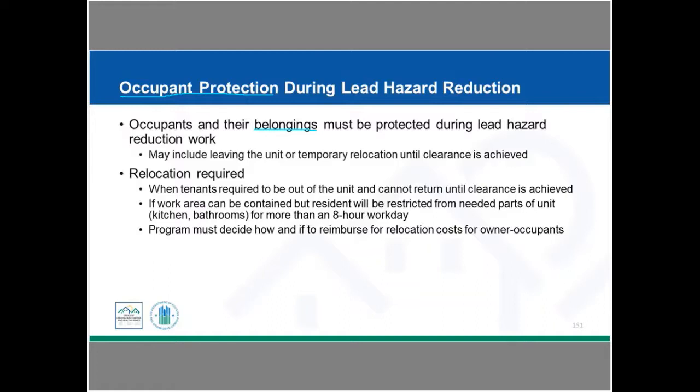So part of our evaluation of the project and the work is to try to determine: can that owner continue to occupy that unit while we're completing that work, and what about their belongings? Where are our work areas going to be? Where is our access to that work area going to be? So where are we maybe tracking in and out, and then making sure that their belongings are also cleared from that. So that becomes part of our planning process, collecting information to determine that we are taking appropriate actions in place.